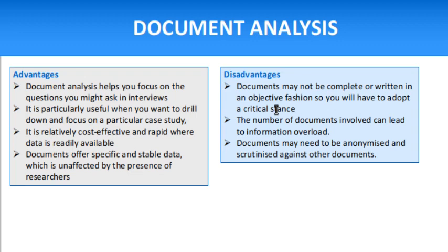Disadvantages of document analysis. First, many times it happens that you are performing the document analysis, but unfortunately the documents are not finalized. For example, you are analyzing the scope document, but this scope document is not signed or agreed. So what will happen? You are giving time for that document, but that document is not finalized. You are giving time for the contract, but that contract is not signed between the two parties. And after the analysis, once you go to the customer, he will say that this contract is not signed, the scope document is not signed.